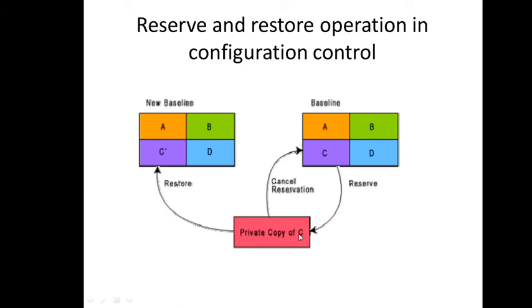So an indication to everyone. Now they will stop working. If the cancel reservation is done, right? So everyone will start their work with this baseline document only. But if the change is implemented and now this becomes the new baseline, it has been a new release or a version is being given.